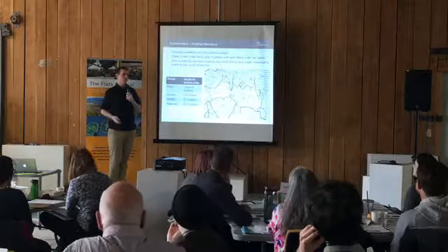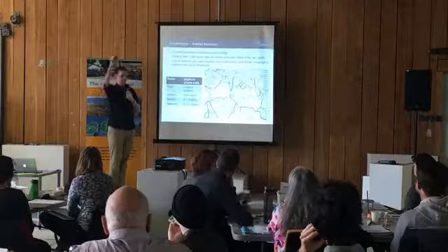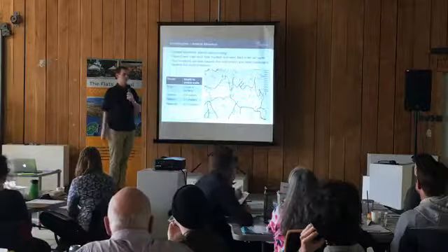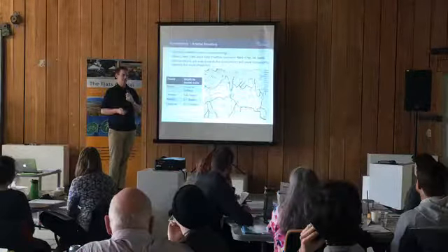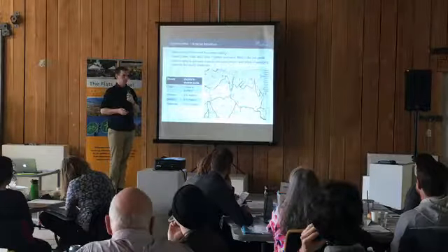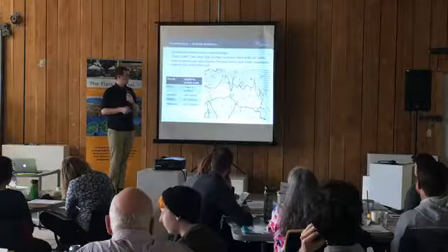I've got an estimate on the left there from our geotechnical review, but what this generally means is the further south the alignment, the more unstable the soils and the deeper the foundations have to be before you get to competent soils that are stable for foundations.